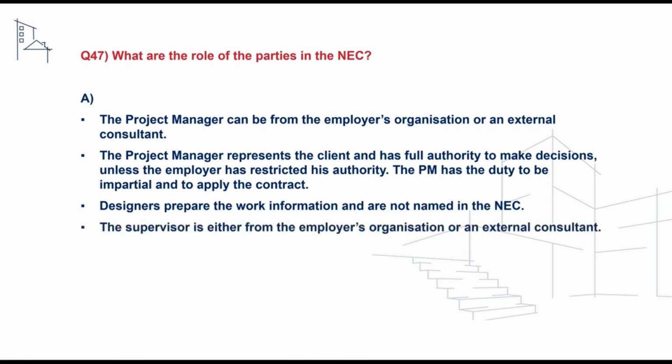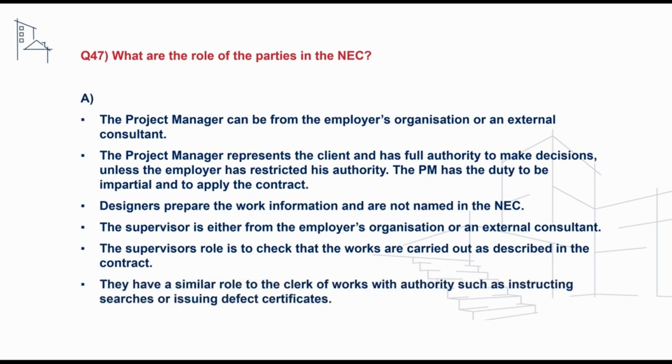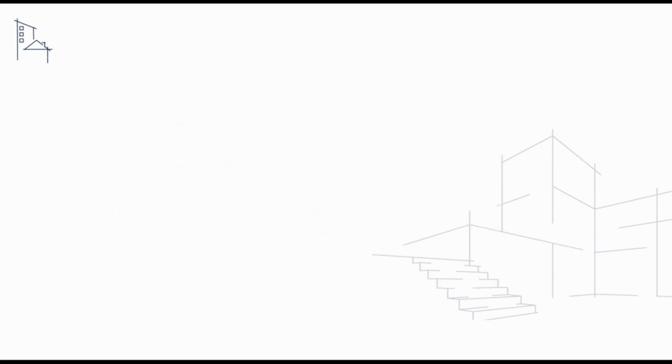The supervisor is either from the employer's organisation or an externally appointed consultant, and the supervisor's role is to check the works are carried out as described in the contract, similar to a clerk of works, and they have authority to instruct searches or issue defect certificates.